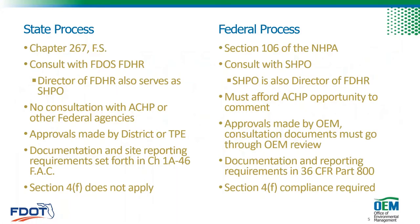Our state-funded-only projects follow Chapter 267 and our federal projects must comply with Section 106. Under 267, the department consults with the Florida Department of State Division of Historical Resources, or DHR. For federal projects we consult with the State Historic Preservation Officer, or SHIPO. Thankfully, the Director of DHR also serves as the Florida SHIPO, so from a project management perspective the only difference is the titles and the recipient — documents for state projects are addressed to the Director of DHR, and documents for federal projects are sent to the SHIPO. Currently that individual is Dr. Tim Parsons.